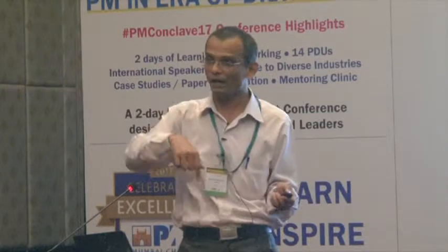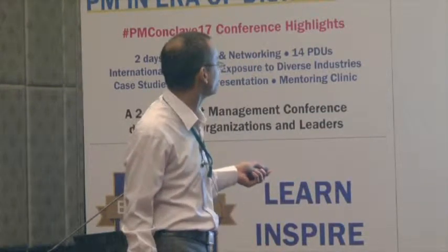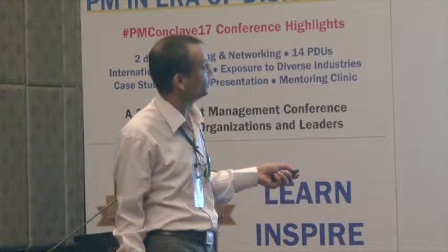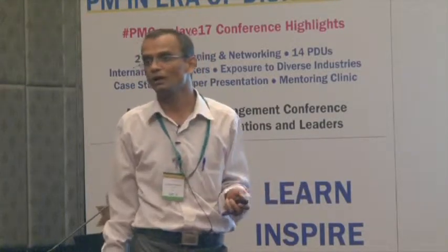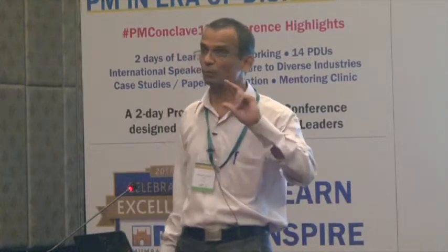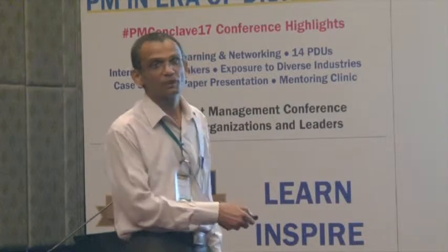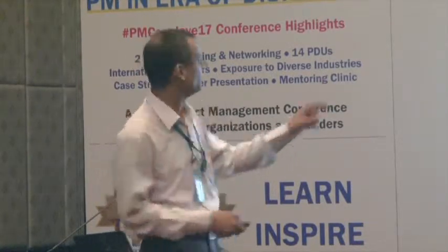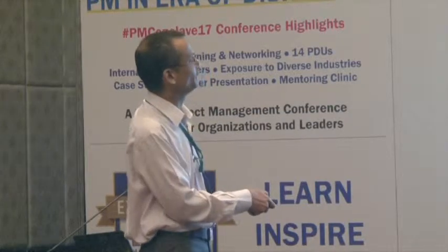And the original critical path, where task X was critical, will be critical only 80% of the time. Now the question will come to your mind, Dinesh, we are not going to execute the project 500 times or 1,000 times or 200 times. But the probability will work. Even in one instance also, there will be a probability. So here, if I have to take a call that the required project duration is 50 weeks, there's only an 87% chance that the project with this scenario will finish in 50 weeks. So we have a 13% risk if we commit to 50 weeks.